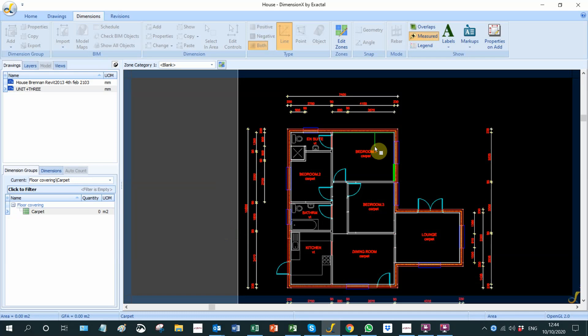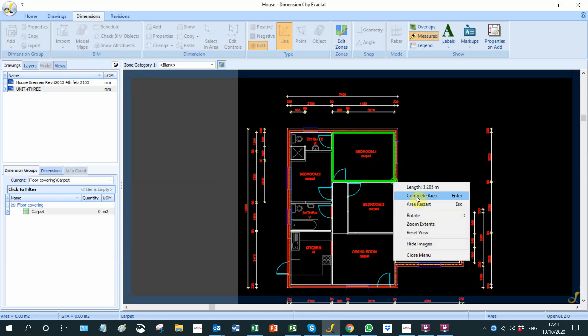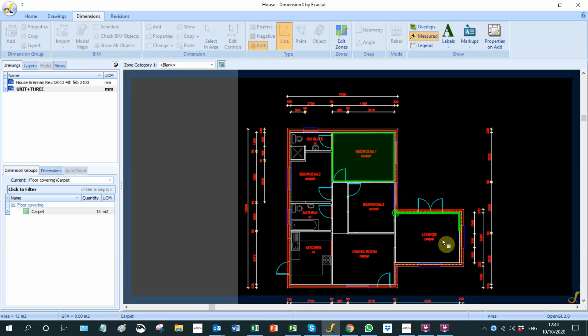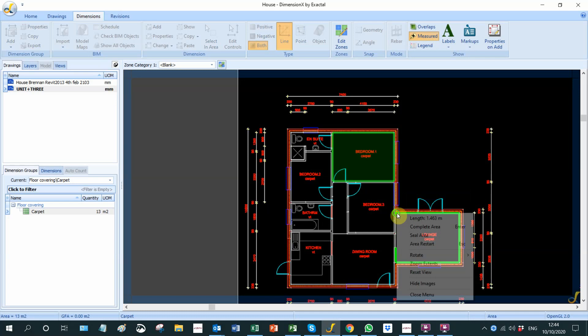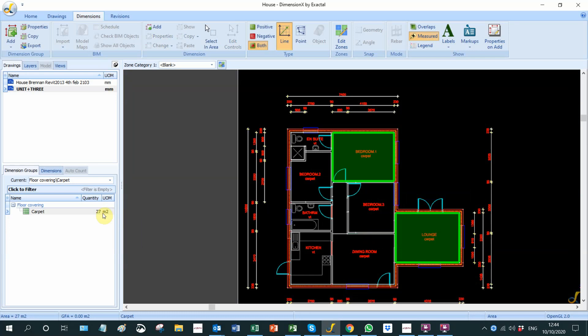Firstly, I have set up the conventional system and we're going to measure the carpets in this house and we'll complete the area in the normal fashion. And we now have 27 square meters plus. As you will read, we have a length of 2973 which represents the skirting or the corners for the ceiling. That is how we do the 2D vector.